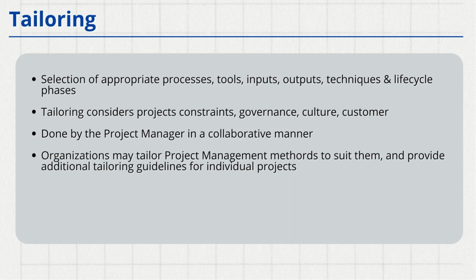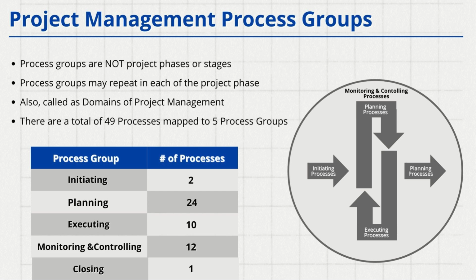Even if team members were working in different time zones with no overlap, all completed activities were updated so that when another person started working, they knew exactly what tasks to pick up next. This kind of tailoring really helped us navigate the complexity of the project, particularly regarding distributed teams and stakeholders. This is just a quick example, but as we go ahead in this training, we will explore more examples. Based on the context, we will discuss various scenarios and determine what works best.